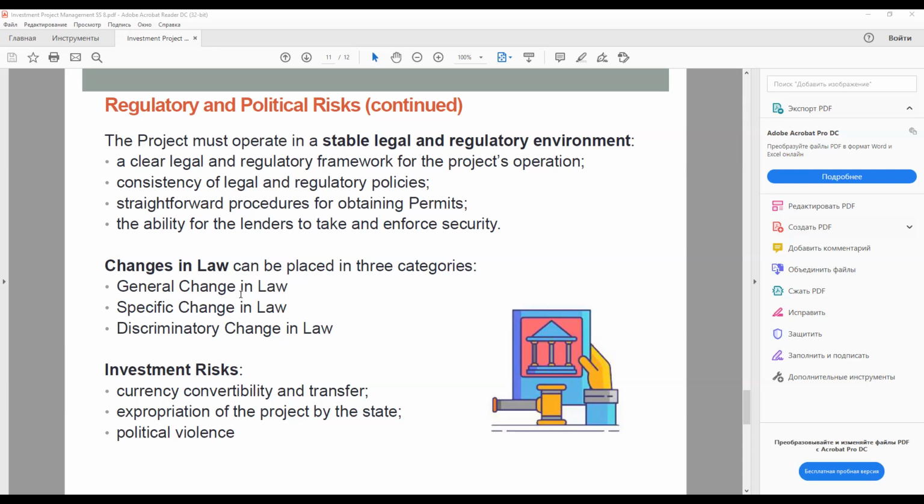The overall issue here is one of value for money. If the purchaser or offtaker does not pay for the cost of change in law, bidders will probably have to create a reserve from the cash flow to provide finance when it is required. This will add a cost to the contract payments, even if the reserve is never used. So even if you never use such a reserve, to mitigate the possible risks you will create it, and it will increase the cost, and ultimately lead to less efficient and less attractive project results.